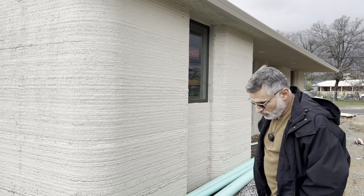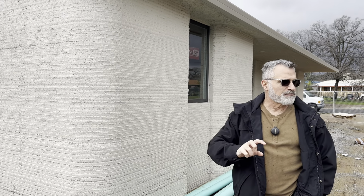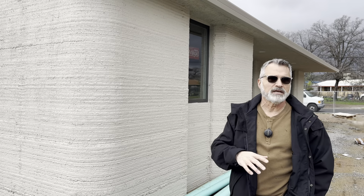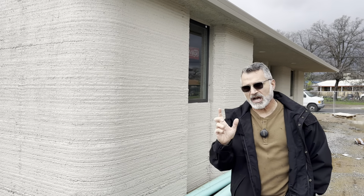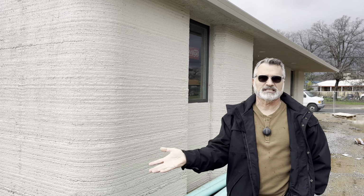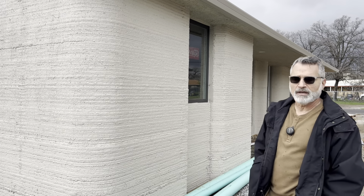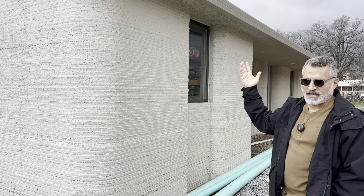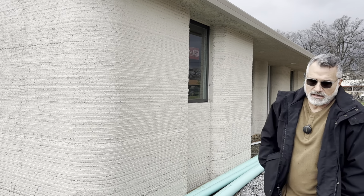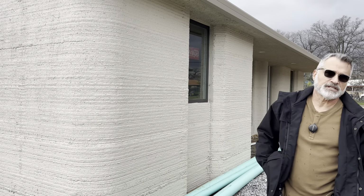Well, again, we built the same home here 6 times here in Reading. And with every subsequent house, minor changes, in some cases major changes were made to the tool path, to the design, but to the naked eye, if the average person looked at them, they may not see those differences, but it saved us a lot of time. I can't tell. Yeah. If I pointed them out, you'd see them. But generally speaking, it's the same 1,200 square foot, 3-bedroom, 2-bath house. But there are little things that were changed along the way that it just saved minutes with every layer, and we got more efficient with every one we built.